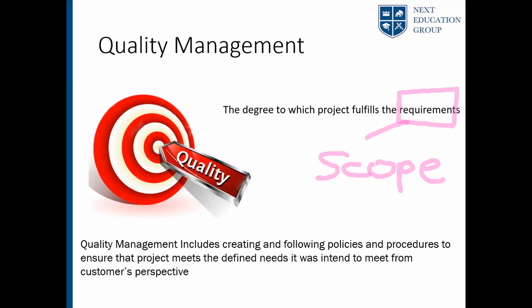Okay. Anyone else having different viewpoints? Again, I would say it's situational. But for me, quality is delivering what is promised. So if you promise the application to return the results in 10 seconds, it should return the results in 10 seconds. If you put additional effort, energy and money, cost, and get it done in 1 second, for me, it's gold plating, right?